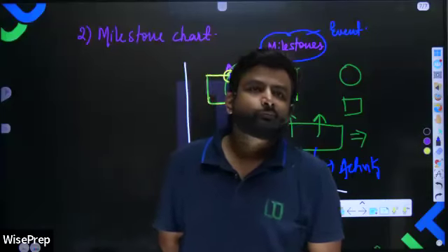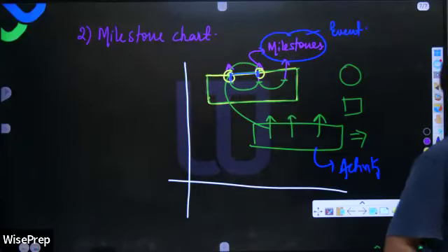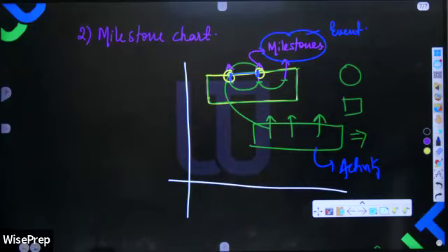All right, so write down: linked bar chart is not unique for a project and varies as it depends on the resources available.